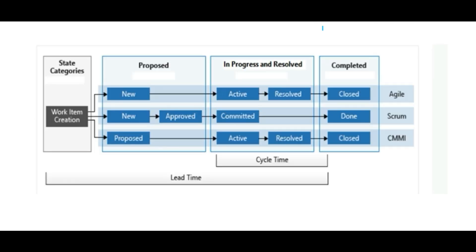Here is a diagram showing how cycle time and lead time look. Cycle time is measured from when a work item becomes active to when it is resolved — that is the time it took to resolve. Lead time is measured from when the item is first proposed, showing how much total time elapsed from proposal to completion.